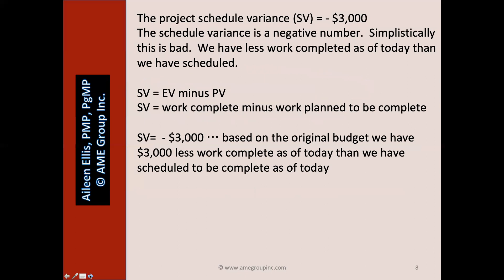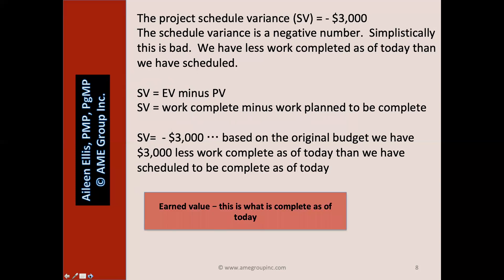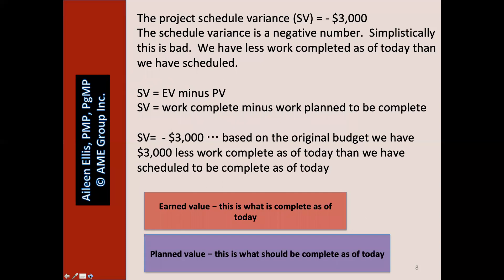This slide again explains in writing the last sample question. If you struggled, go through this slide in detail. The schedule variance is a negative number — simplistically, this is bad. We have less work completed as of today than we have scheduled. The earned value is the measure of what work is complete as of today; the planned value is what should be complete as of today. We have less work complete than we should — our schedule variance is a negative number.